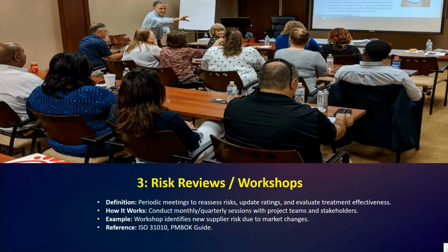Next we have risk reviews and workshops. Risk reviews, or you can say workshops, are planned meetings that focus on reassessing project risk. They allow the project team and stakeholders to come together and evaluate the current situation. The main goal is to update the risk register and review the effectiveness of the treatment strategies. These sessions also provide an opportunity to identify new or emerging risks.